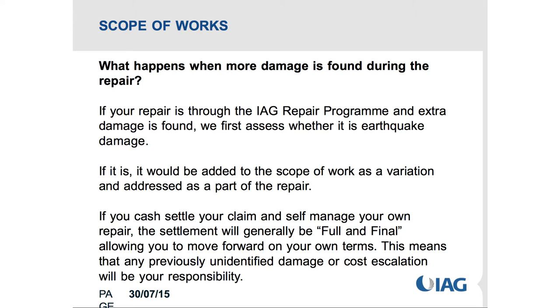If you're through a managed repair program, additional damage found is treated as a variation. However, if you choose to cash settle your claim and manage your own repair, the settlement is generally full and final. If you have selected a full and final cash settlement, then if any other damage is found, the cost escalation and any previously unidentified damage is your responsibility. You would want to be confident that the cash settlement is adequate to capture all of the damage.